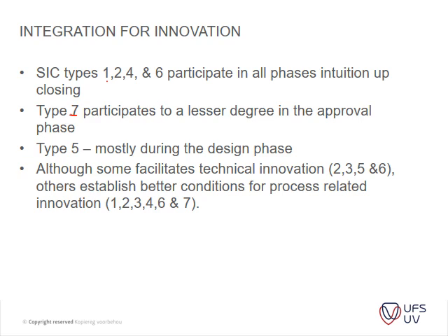Let me just get to that, sorry, here we go. Okay, so champions: 1, which is your mediation partner; 2, which is your integrated client team; your delegated project manager, no, sorry, that's 3. Number 4, your community support organization, and 6, which is your project integration team, are all involved in all the phases up to closing. Okay, and then type 7, participation of the organizer. They're usually just involved to a lesser degree in the approval phase.